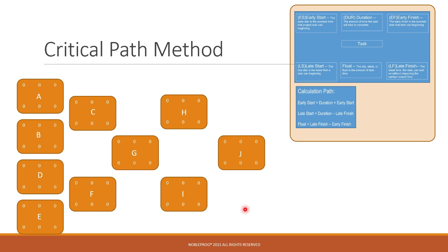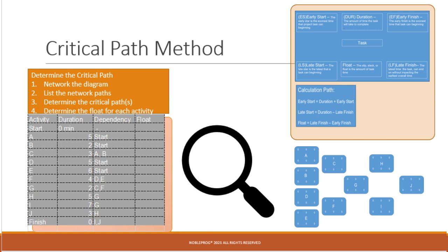Taking a look at a critical path, if we call these the sequences of events and the next steps that follow, we can usually see there's a pattern that goes into this. As you look at this critical path for our example, we've added different durations based on the activities that go into it. The activities also have dependencies. So if we're starting, that would be the start point. But activity C was dependent on the completion of A and B.